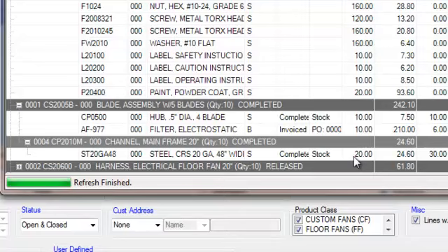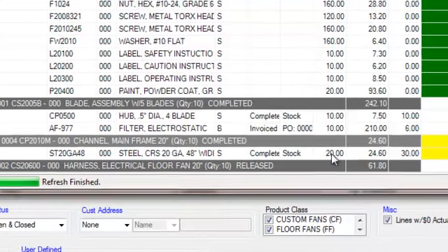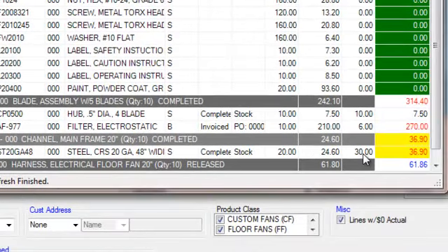Completely. We have an estimated quantity of 20, and we actually used 30. So this is turning yellow. Again, we have a performance indicator out there that's saying, okay, when my actual is above my estimate by a certain tolerance, turn it colors. And when it's yellow and red, it means that it's really far off. Okay, red's a little bit off. Yellow and red is really off.